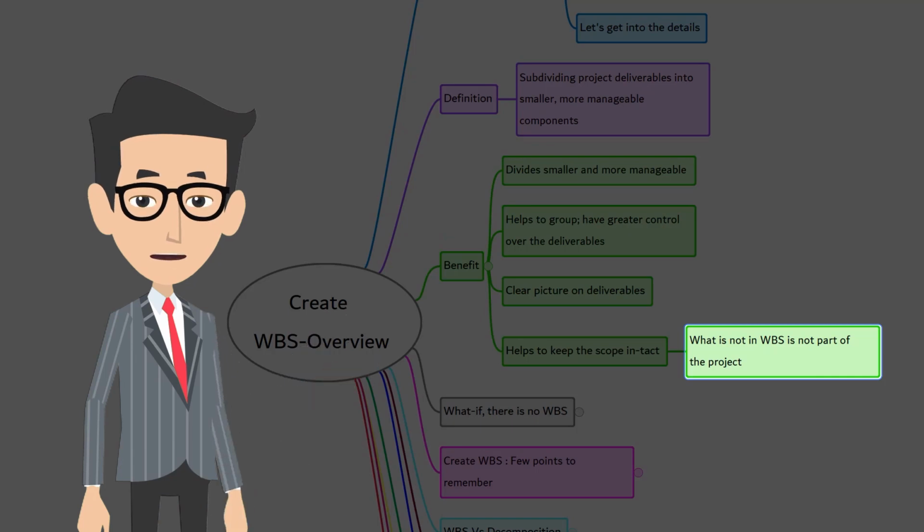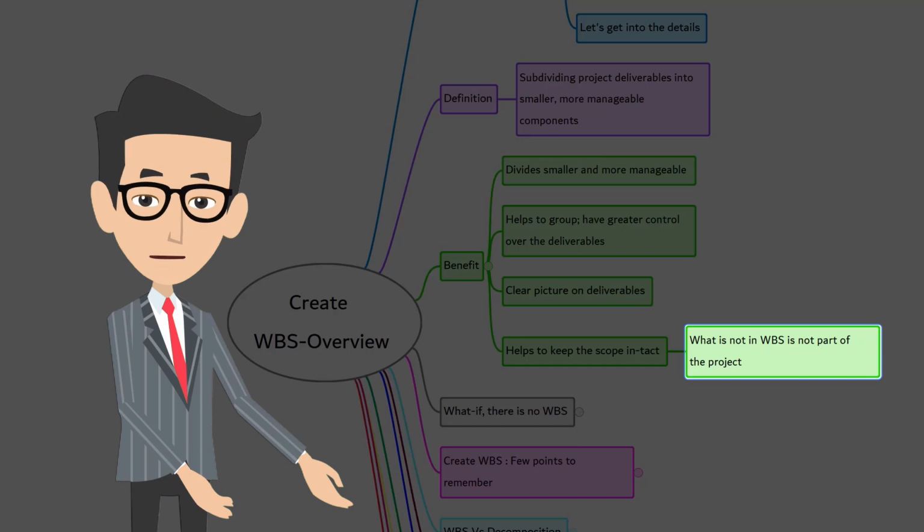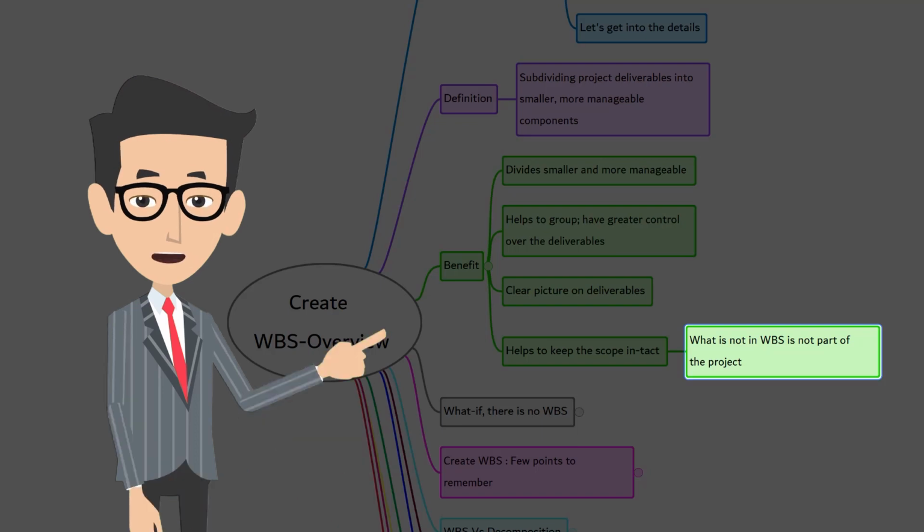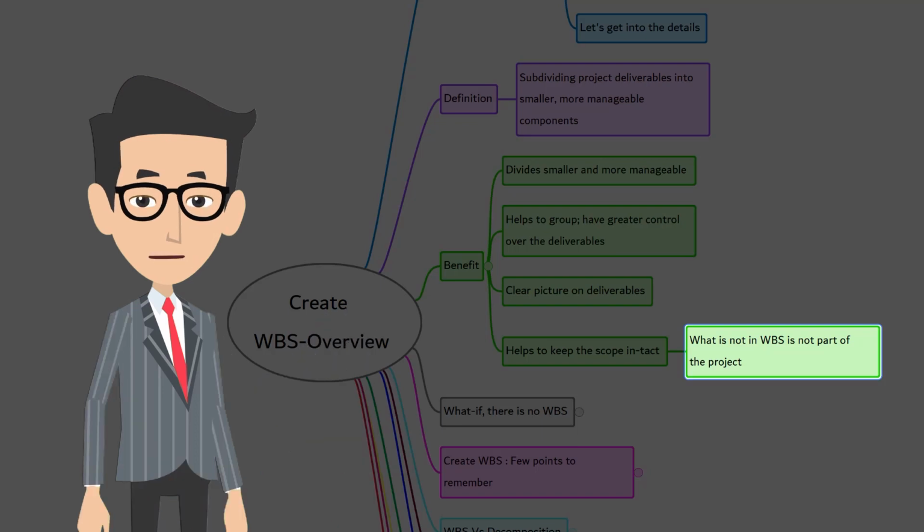No project is done without a change. Any change proposed will and should go through the change control process. This is something we are discussing from beginning time and again. Once changes are approved, they become part of the project. The project scope baseline has to be updated.